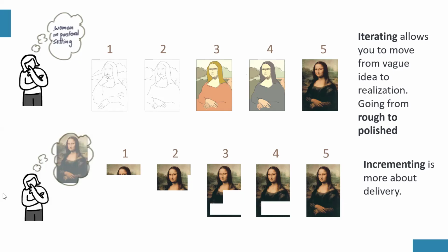Sometimes you might be focused on iterative alone. And the example I gave is, you find a feature in WhatsApp, maybe a button, and it used to be red. Then the next time they release it, it is now blue. That's iterative, which means they are refining the same thing. But incremental is, you find a functionality that was not there before.